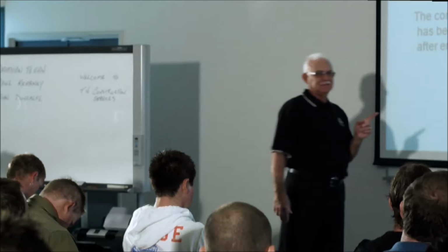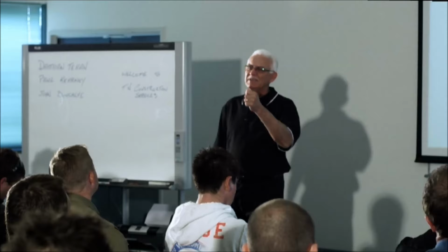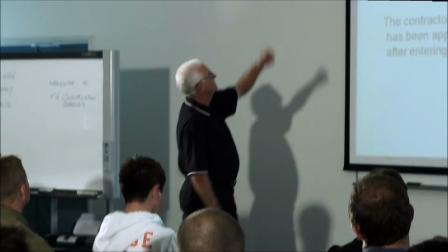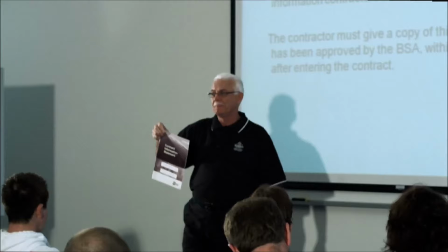Now, I'm a builder, so I'm on your side, but the government brought out a law to say, okay, big nasty building industry, you're going to have to give advice to the owner before you enter into a contract about what it's all about. So someone decided that they would come up with this contract information statement. And basically what it does, it tells the owner what this contract's all about in simple terms. It's the law.